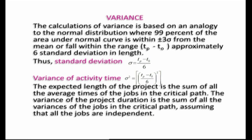The calculation of variance is based on an analogy to the normal distribution, where 99% of the area under the normal curve is within 3 sigma limits from the mean, or falls within the range t_p minus t_o — approximately 6 standard deviations in length. By this logic, the standard deviation sigma equals (t_p - t_o) / 6. Therefore, the variance of activity time, sigma squared, is: sigma² = ((t_p - t_o) / 6)².